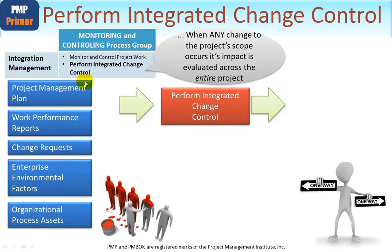Let's look at the inputs. First of all, the project management plan — the scope, schedule, and cost baselines are an important input here, as well as the other plans which provide the backdrop against which any change can be analyzed and considered.